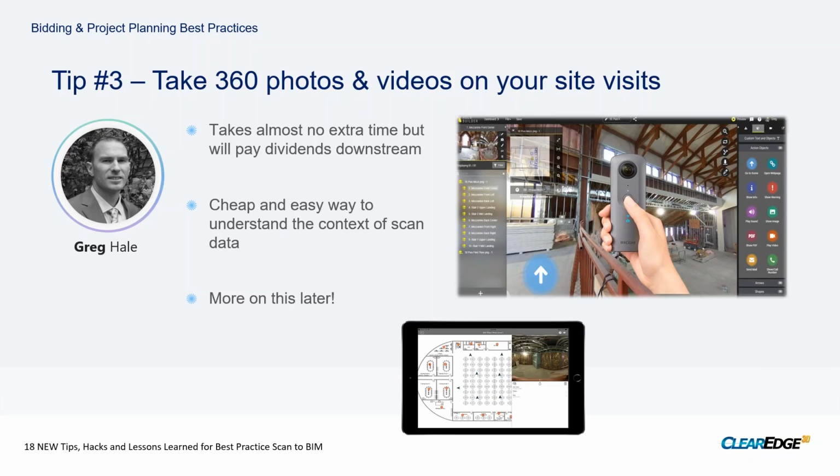And it really helps our own internal team look at these projects in an easier fashion as well from any smart device. Well, and I really love that relative to specifically bidding a project, before you've even got the job, this is just such a fantastic way to capture the conditions so that you can put together a better bid, so that you have imagery that you can share with the client for challenging areas or things that are going to require extra work, and just help the team understand it, and actually building up a good scan plan that really accounts for not just the floor plan of the building, but actually the entire space that you're having to operate in. So it's a fantastic tip.